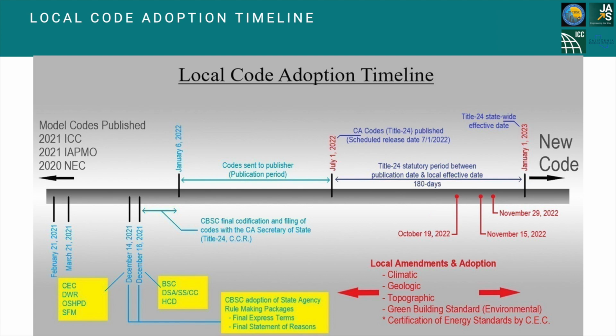If all goes well, the Appeals Board can conclude discussion and consideration of proposed local code amendments on this date and submit a recommendation to the City Council for adoption of the local amendments. And the final critical date represents the opportunity for the code official to introduce the local code amendments to the public for the very first time. Working backwards on the timeline again, we find that September 21st is the third Wednesday during the prior month when the Appeals Board is scheduled to meet.